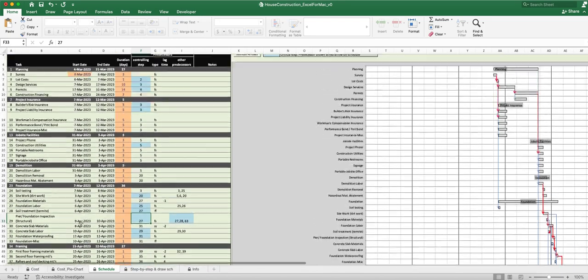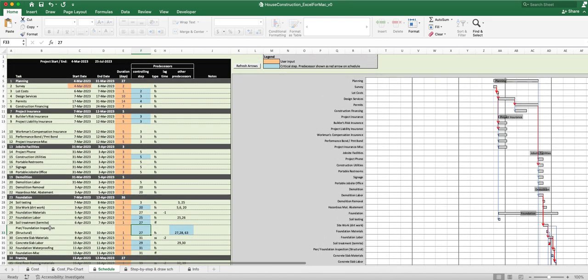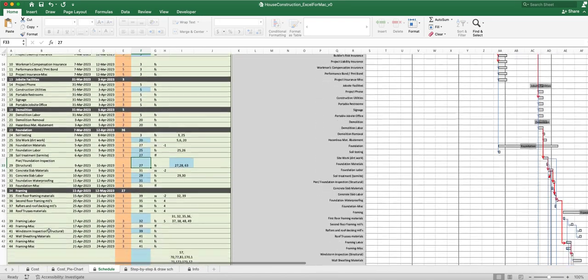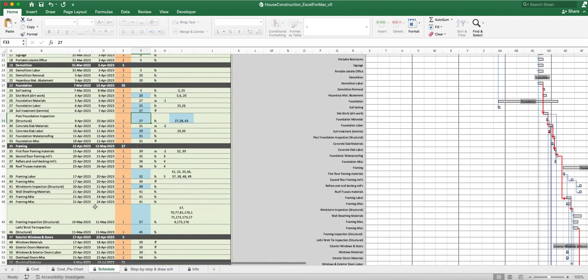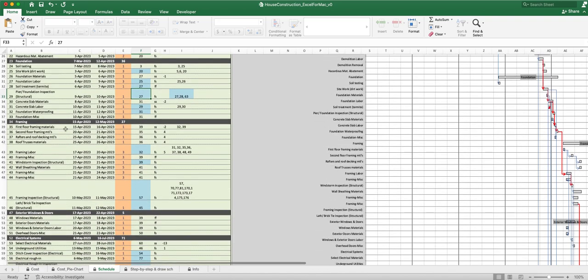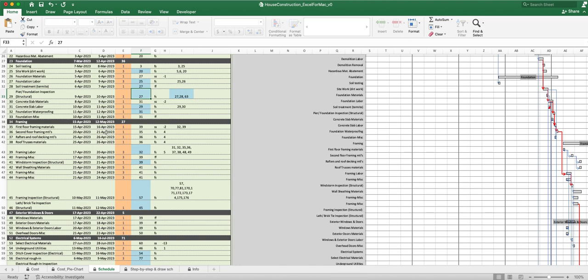When we go to the schedule we can see that the framing is right down here. You can go through and say okay, the first floor framing materials I need to be getting those around 15-16 April. I need the second floor framing trusses between 20 and 21 April. The rafters and the roof decking materials I need those between 25 and 26 April. The roof trusses material I need those coming on site about 25 to 26 April.